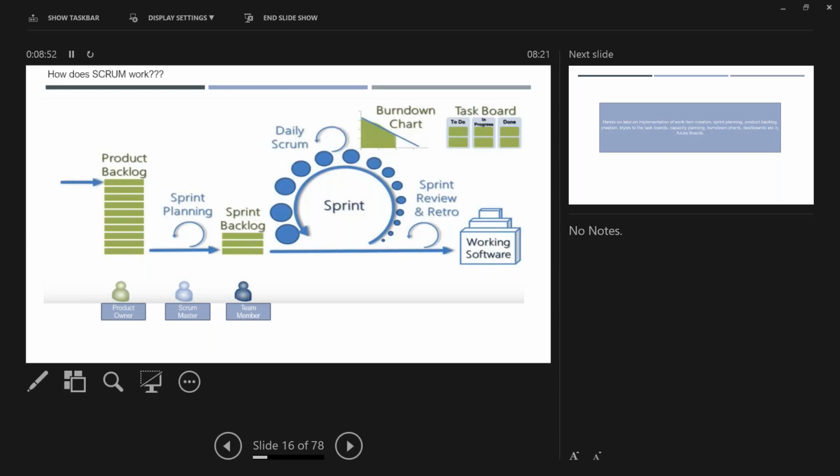Now, the management has already estimated that this project should be completed in 4 months. And 4 months means, taking the sprint duration as 2 weeks, you will have 8 sprints for this project to be completed. So how do you do it in the Scrum methodology? We will not go ahead and take all the features, develop them and push them to the QA and production environments.